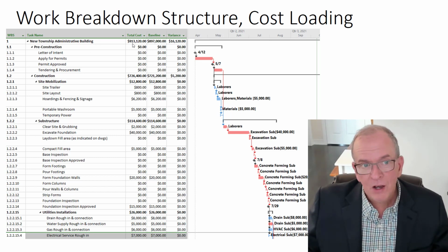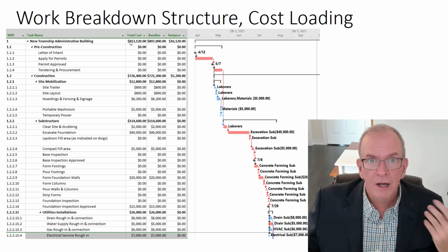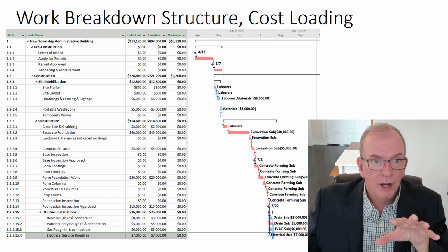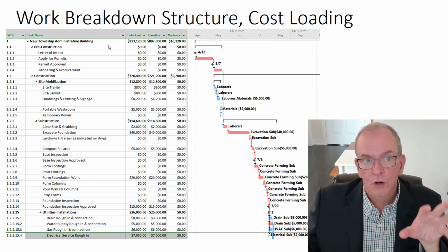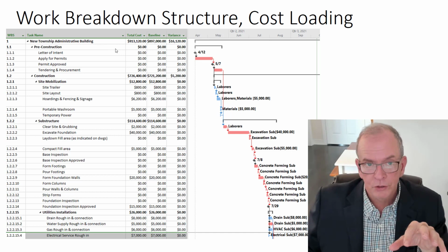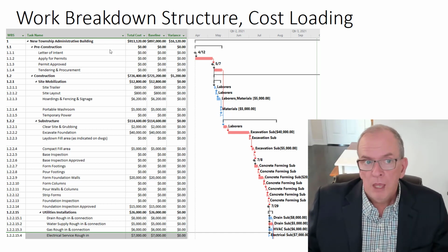Now on this being a cost loaded schedule, I would likely still have it separate from this just because I'd like to manage that separate. So this is basically my budget that I'm identifying and I'm monitoring on the project. I may change it based on drawing on some of those contingency reserves. And if something goes beyond that, then it's going to be under the management reserves. And that is, again, above this cost line.